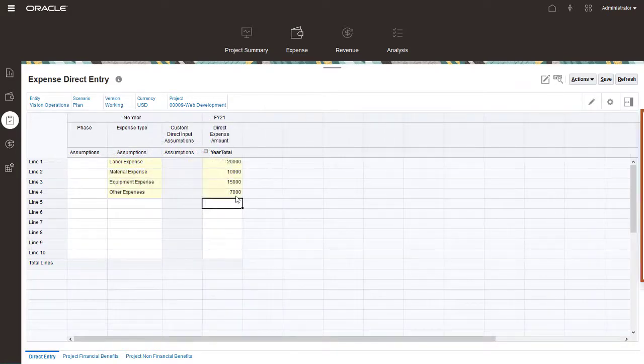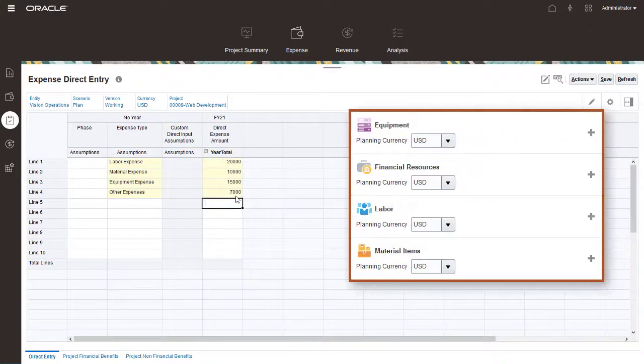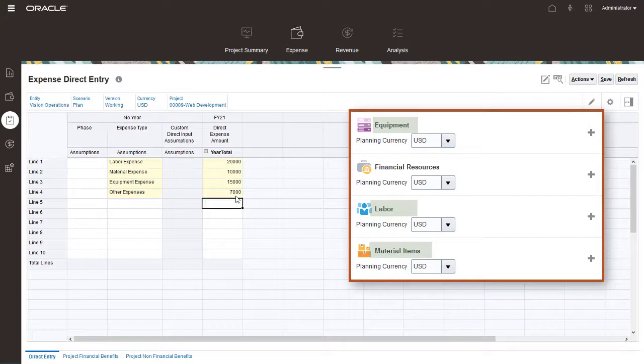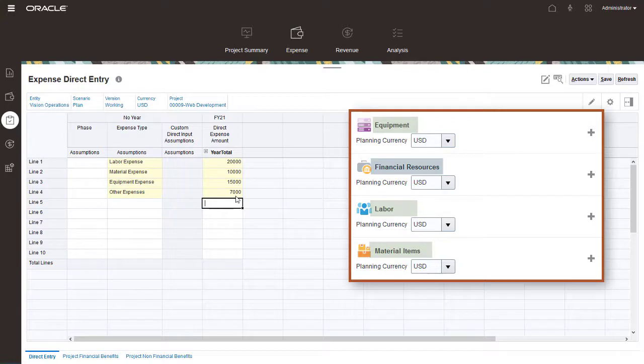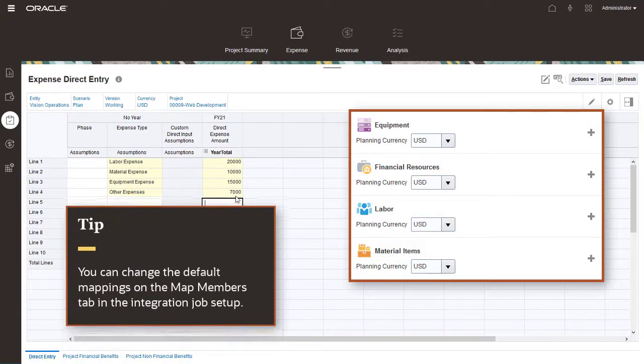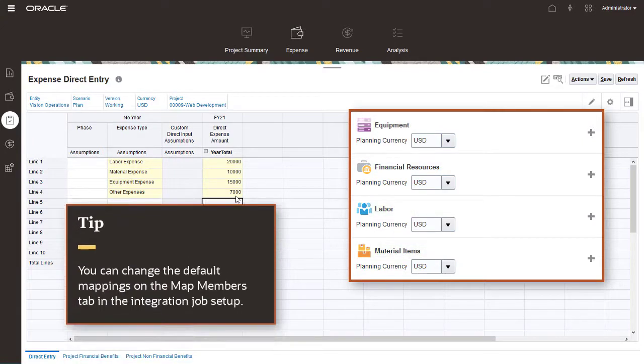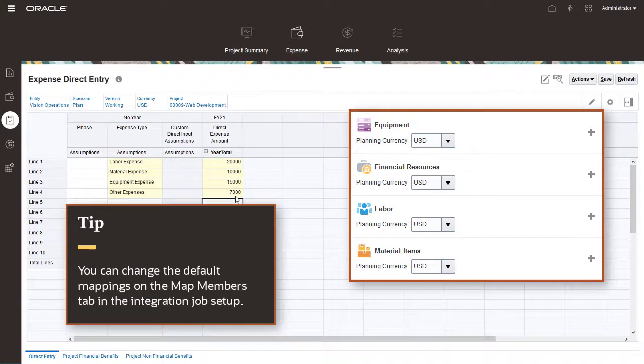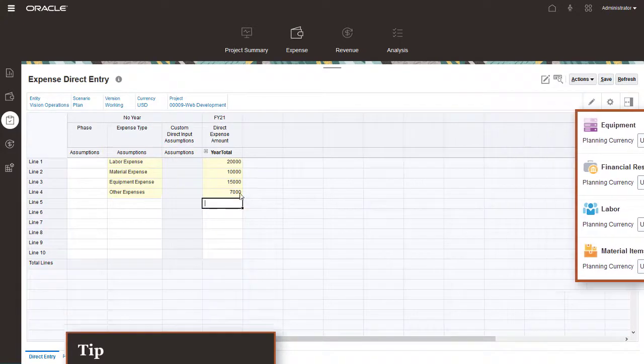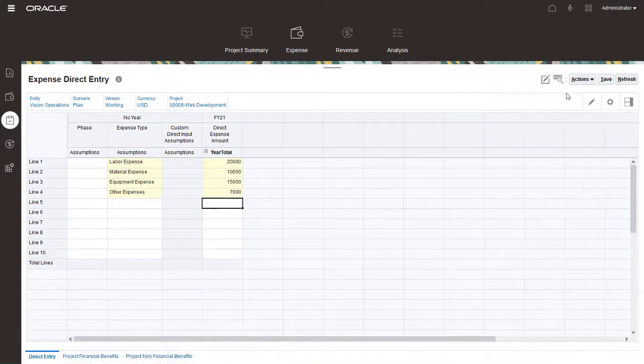Labor, Material, and Equipment are mapped to the Labor, Material, and Equipment resource classes in Project Management. Other expenses is mapped to the Financial Resources resource class. You can change the default mappings on the Map Members tab in the Integration Job Setup. Save the data.